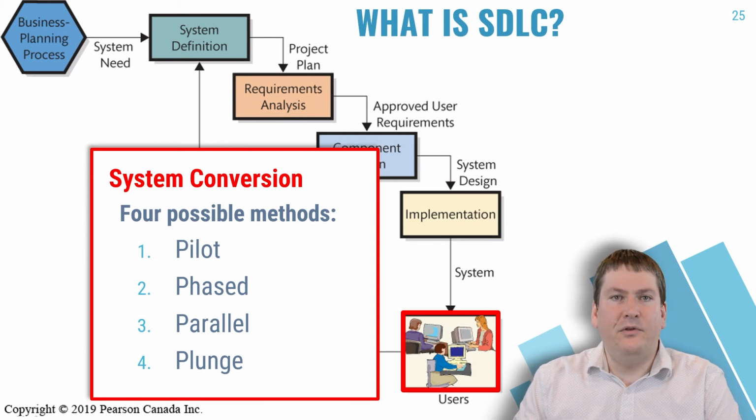A real-world example of this would be another social media site called Digg. Digg used to be a link aggregator, like Reddit, and one day, just like Reddit, they decided to change their user interface. However, unlike Reddit, they did not run the sites in parallel or phase it in. They simply took the plunge and switched it over. It was a massive failure and hated by most users, and it played a large role in Digg going under after most users migrated to Reddit.